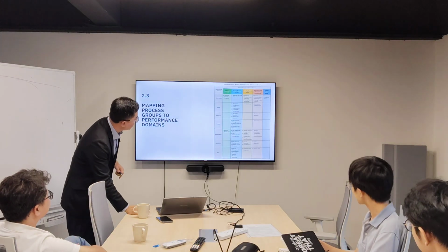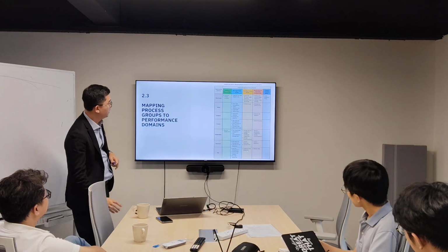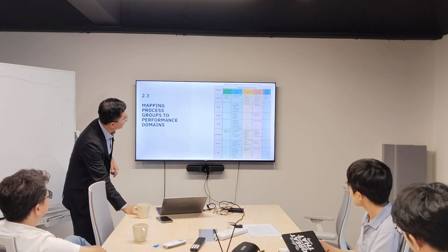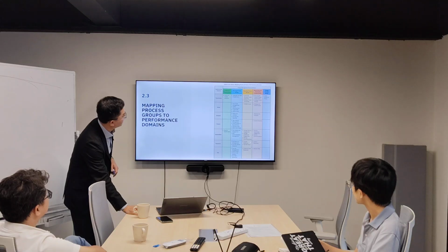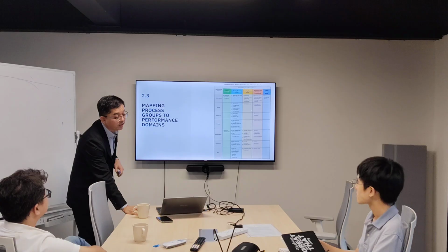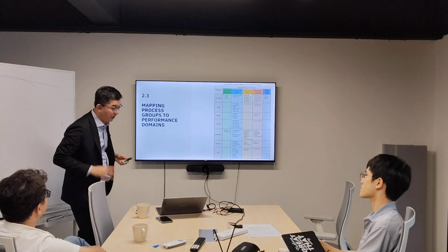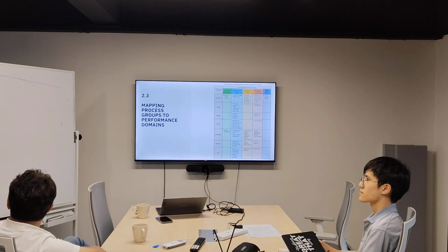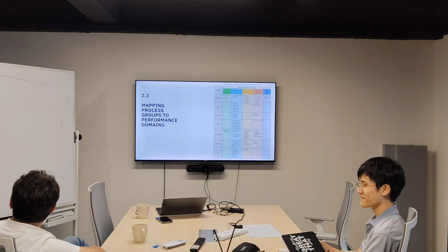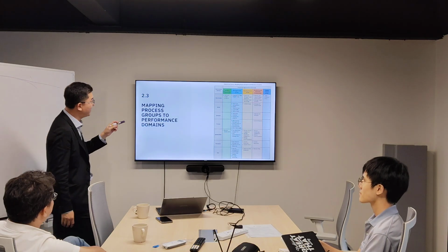Okay? Then example. When we met, during our executing process, we need to validate our work scope, confirm already this is what we want to do. Example, we plan to hire 5 speakers in that talk or the symposium. So we need to validate. How do we validate? You need to confirm whether they got time or not. Their time is suitable or not, right? This one is during executing.